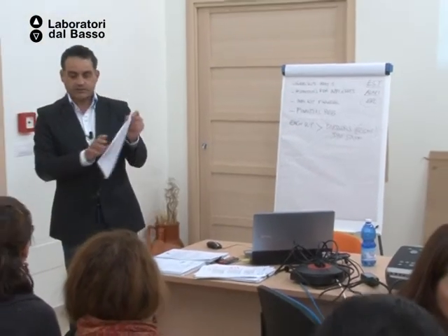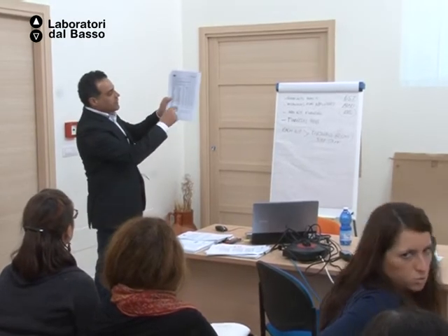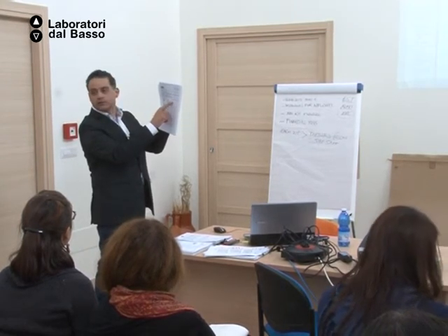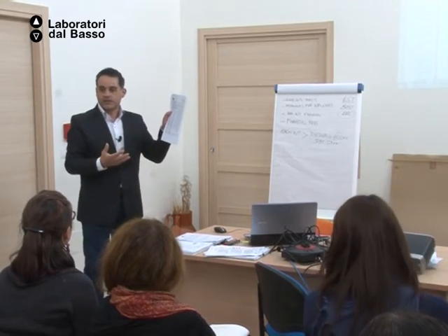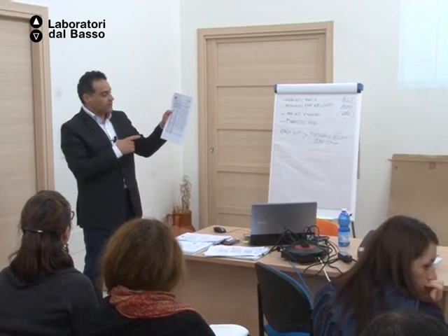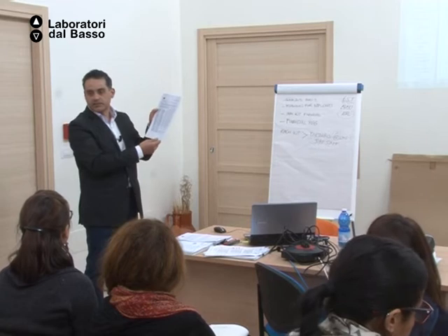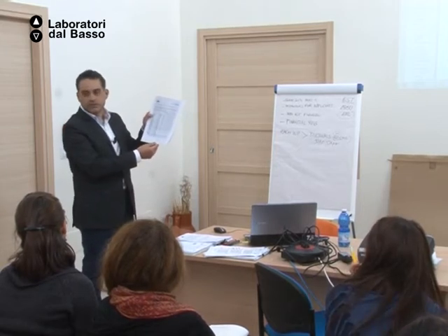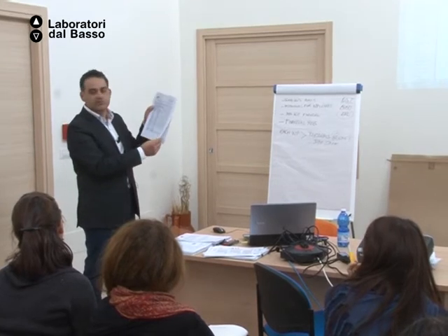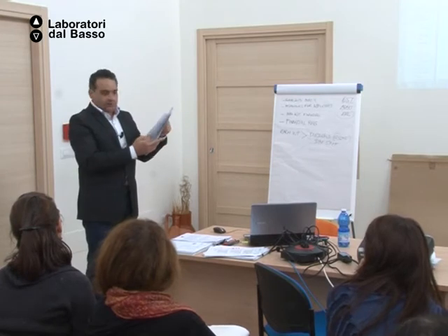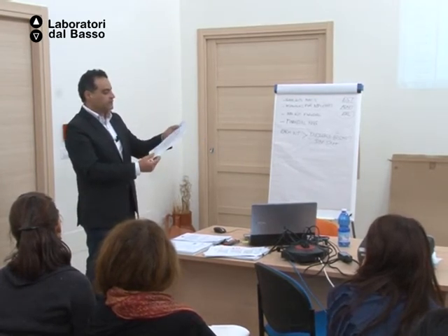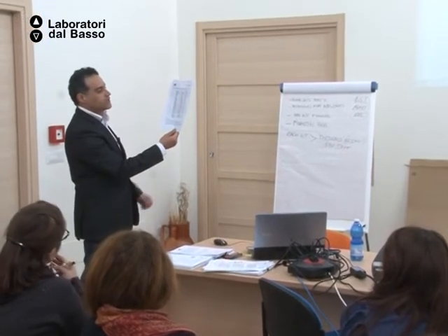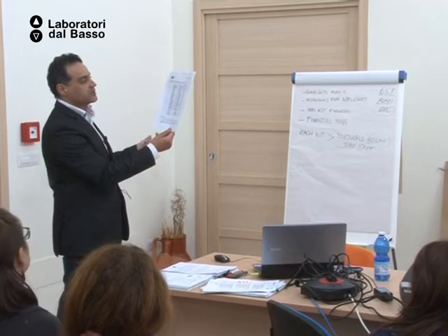You have in this document this kind of tabs, okay? And you have here, for example, what I said the other day, the maximum amount that you're allowed to consider for a day of staff according to their categories. And you will see, obviously, that it's a bit polemic because in Romania they receive 51 euros a day for a manager, and in Belgium they receive 460 euros. Well, this is really polemic when we work with partners. It's a bit complicated. Then you have the table 5B, which are the maximum eligible daily rates for subsistence costs for these multilateral projects, networks, and accompanying measures.